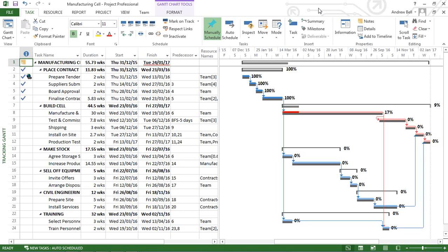What is Microsoft Project? Well, basically, Microsoft Project is a database. It contains lots of fields of information. So against the task name, we might include the duration, the start, the finish. The default view in Microsoft Project shows the entry table, and we can see some of the field names already shown against the task names, things like the indicators, the task ID, the duration, the predecessors, or the resource name.